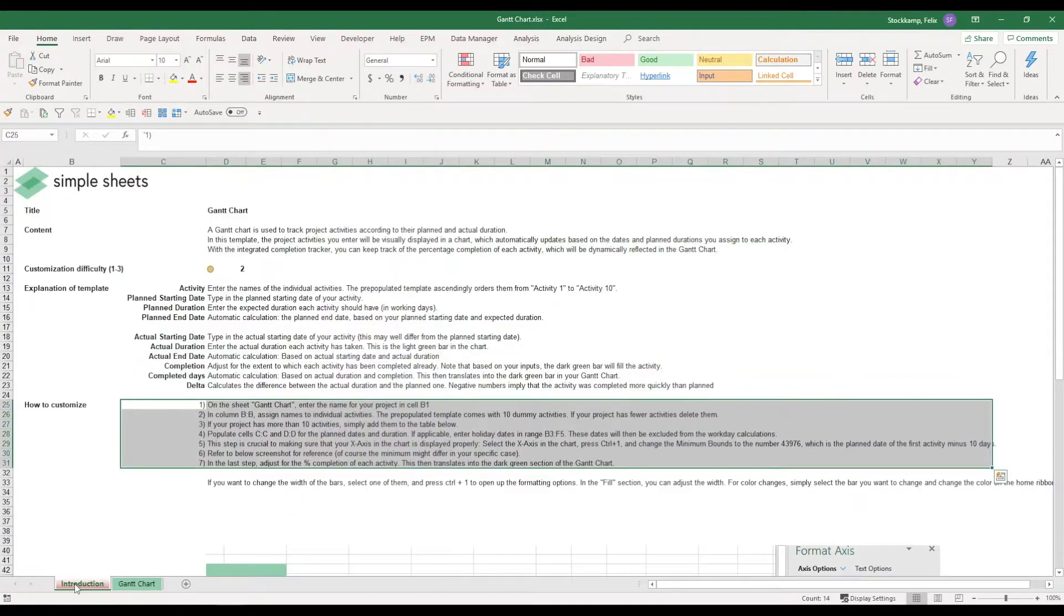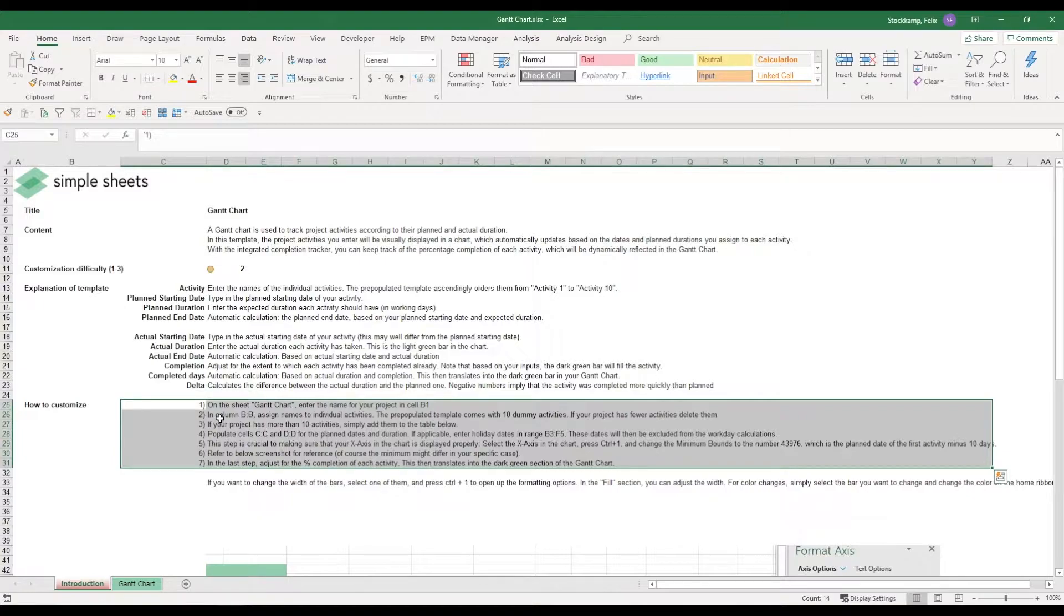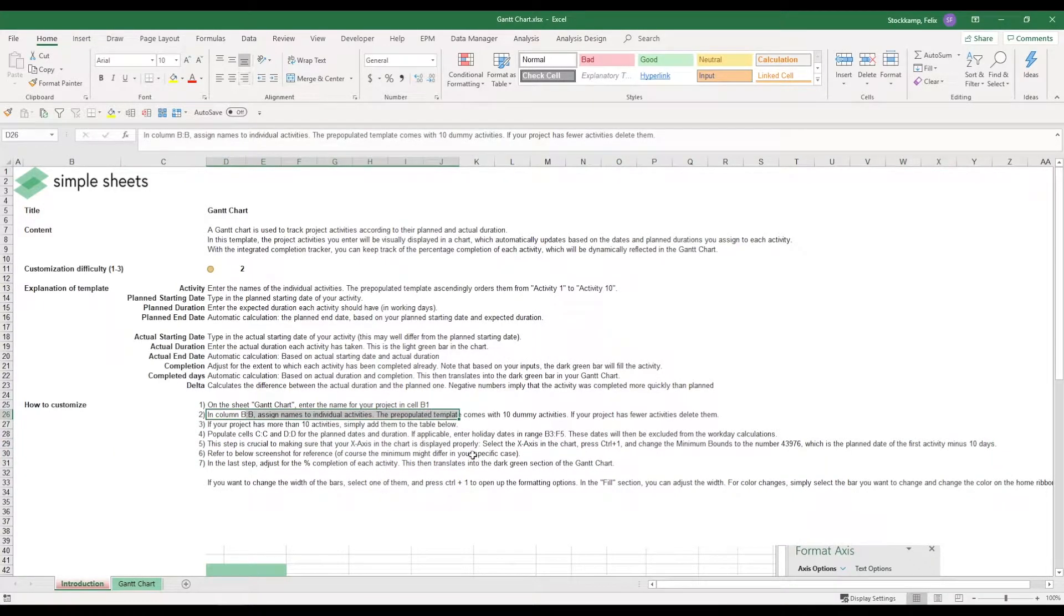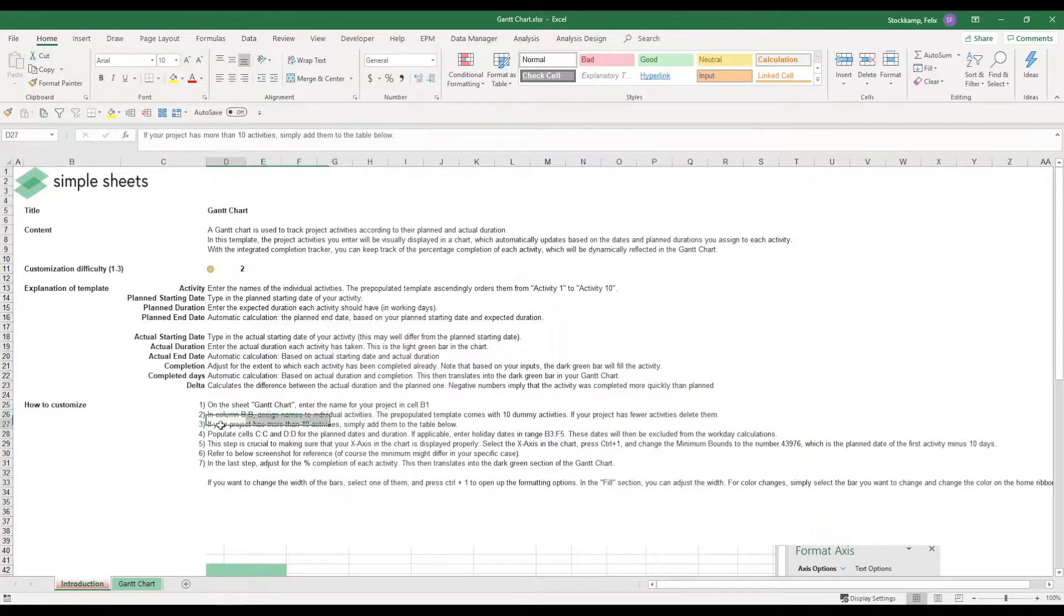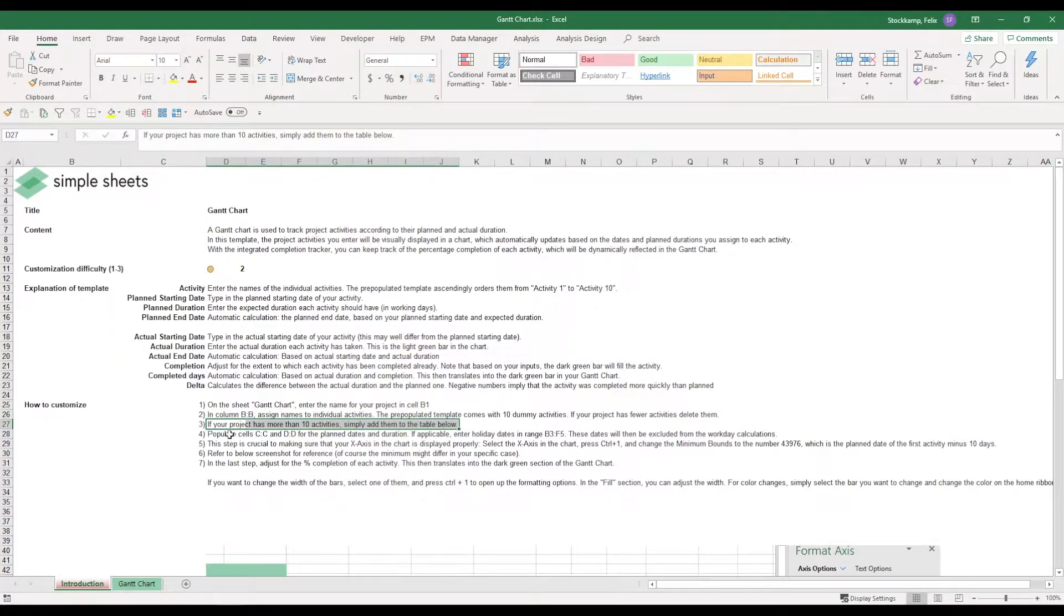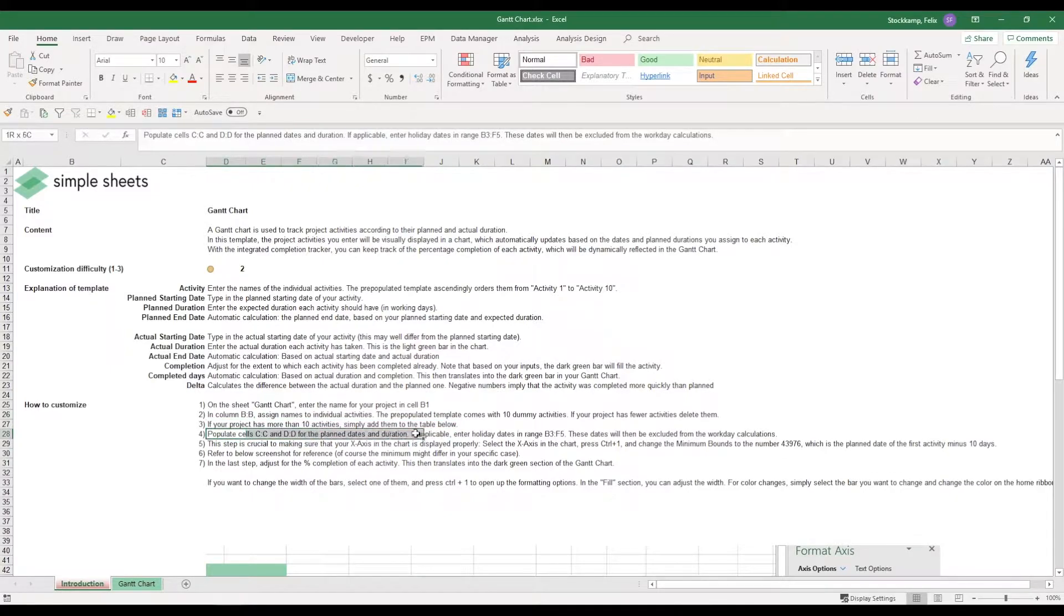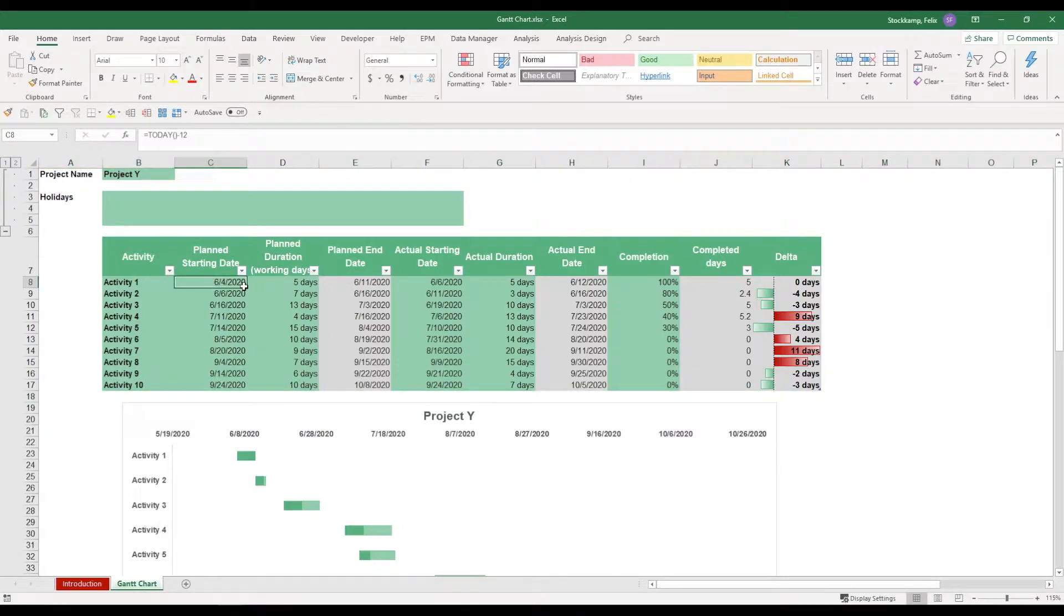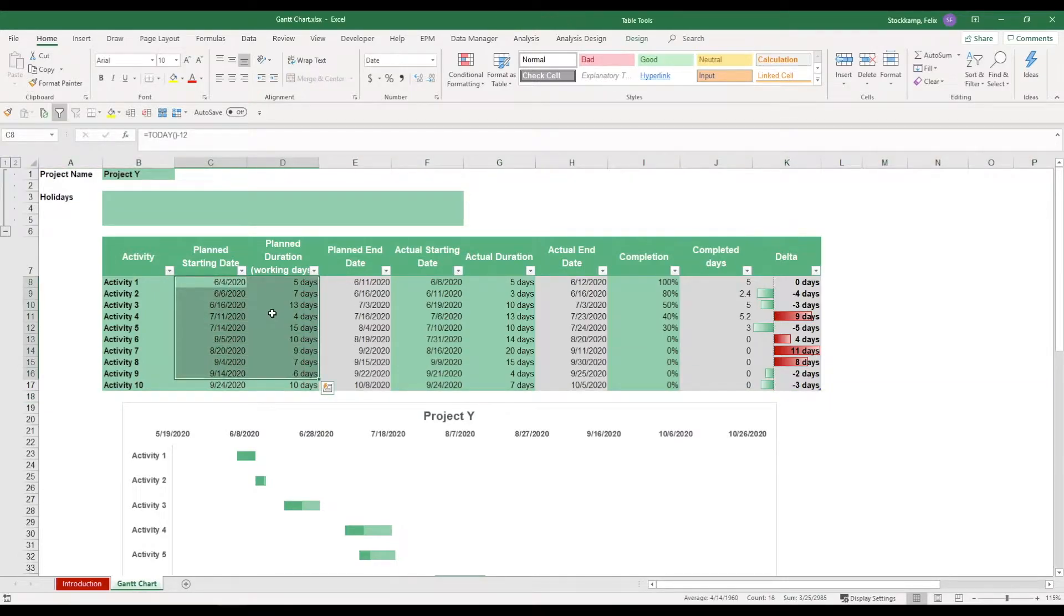Just can go ahead and quickly remove this row and we go back to the introduction. Now that we have assigned names to the individual activities, and maybe have added some of them, now we need to go ahead and populate the cells C and D for the planned dates. So we go ahead and enter these numbers, say activity 1 starts on the 4th of June and it takes about five days to complete.